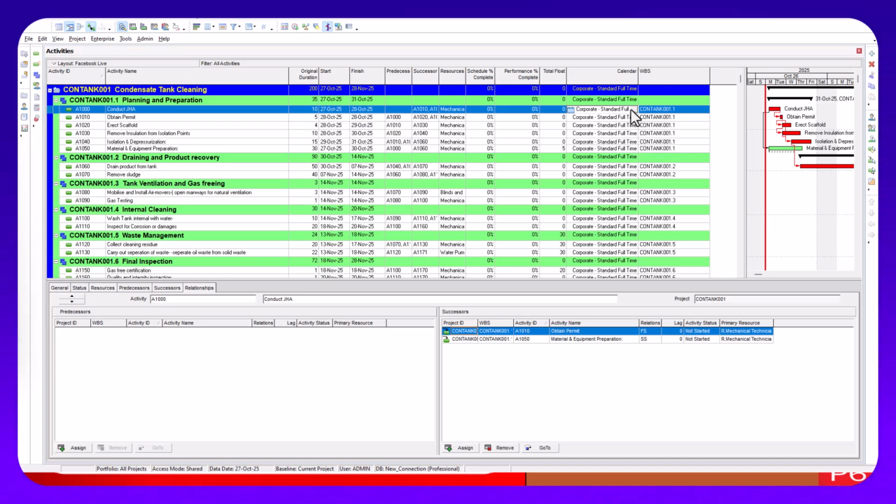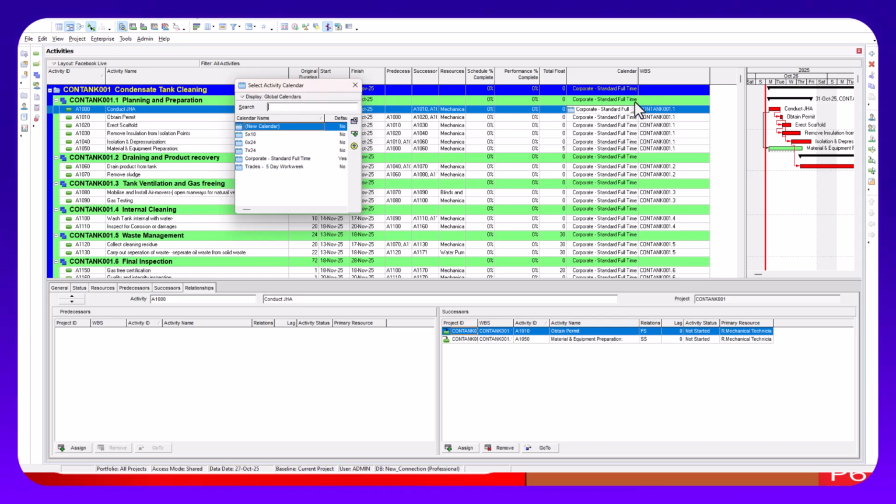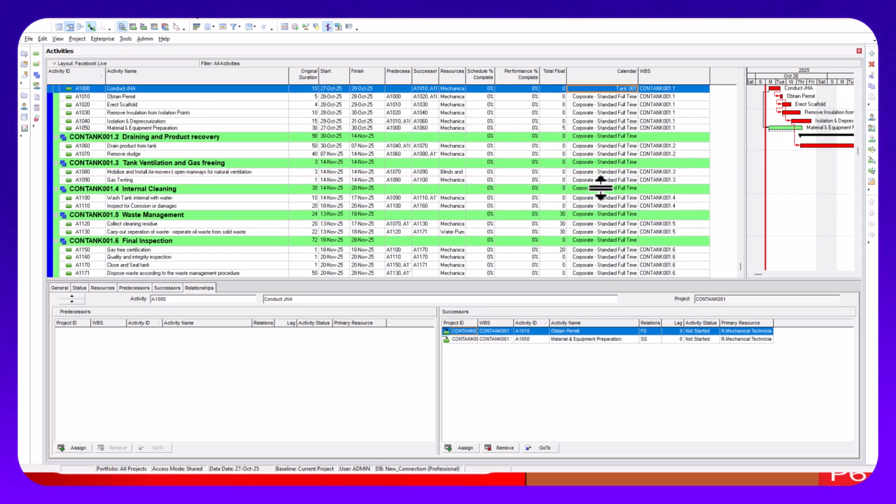In this case, I'm going to remove the calendar I had before and take the one for the project. I've clicked this, and if I open it, I can pick the project calendar, and from there I just get this done. So I've assigned it. This is how to assign: first, you go to enterprise and create your calendar. After creating calendars, you have to assign a calendar.